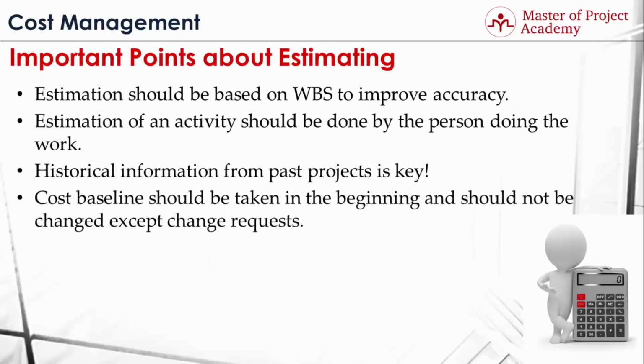Cost baseline should be taken in the beginning and should not be changed except by change requests. Because cost baseline of a project will show your initial project cost estimation, and during the rest of the project, you need to meet these estimations to complete the project on budget. In order to measure cost performance of the project with the actual costs, you need to consider baseline values to check whether you are under budget or over budget.